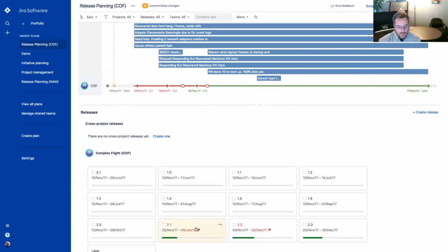And if I have a problem related to the completion of that release, it'll automatically be red and show red. So there's some sort of staffing allocation or dependency that's going to cause this to be too late. But up here you can see the line is green. So something resolves itself in January. And again, we're going to look at more of what that means.